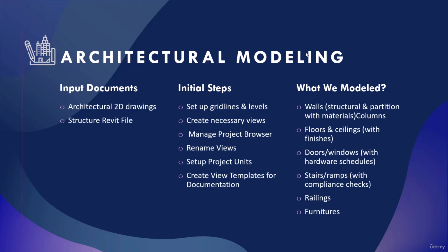Be careful about this. Well, now we are in the architecture file. What things do we model? This is also completely clear. We always start modeling with the wall, because the rest of the objects are usually connected to the wall.